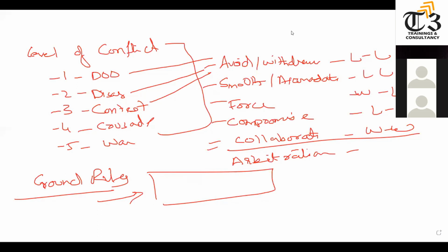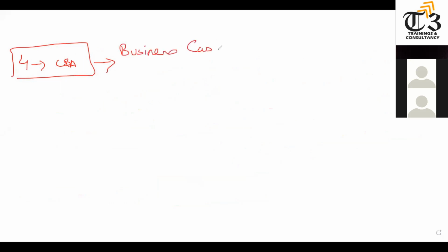So far, look, we haven't started the project. So now once this meeting is over, and they said we have selected option number 4, which is cost benefit analysis, that how much we will spend and how much we will get in return in how much time. So based upon that, the sponsor, or it could be the business analyst, will prepare the business case. Now, the business case contains the information why you are going to do the project: because of market requirement, customer requirement, technical requirement, government requirement, because the product life cycle is going to be finished, because of maintenance, because of shutdown, because of any reason we are going to do the project.